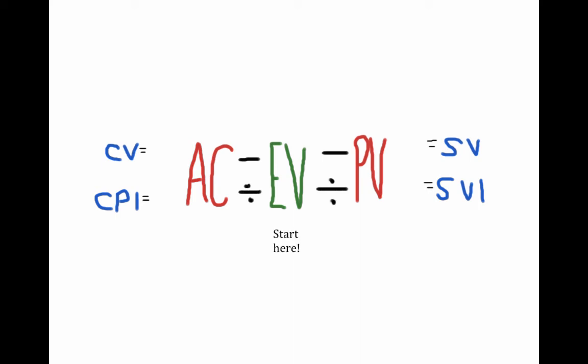Now, start from earned value and read from right to left to get the formulas for cost. For example, EV minus AC equals CV. Then, do the same from left to right to get the formulas for schedule. For example, EV minus PV equals SV.